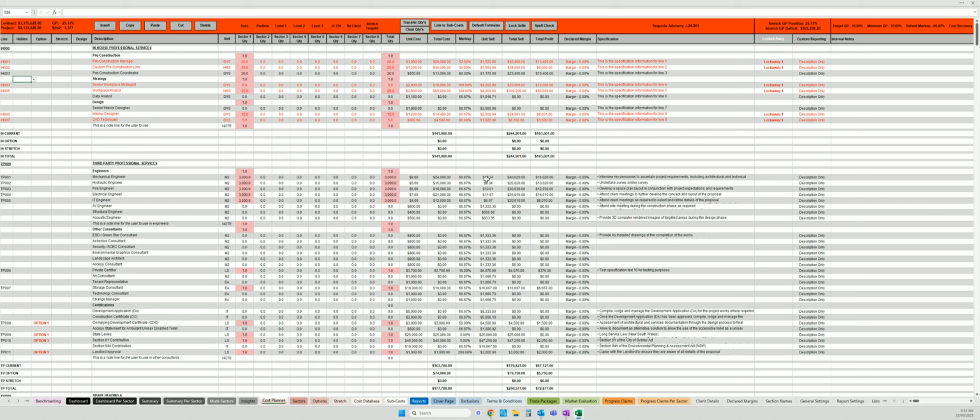So I don't need to jump around on screens to understand where my position is. As I'm cost planning the project on the cost planner, my ribbon is updating automatically. I can see my current position on the left, and I can see my stretch position on the right. In this instance, my GP of 25.11% is the same as my stretch position of 25.11%, showing a stretch GP deficit of 165,000 odd dollars. And as I go through this cost planner, these numbers will update live. So right now, I need to look through the cost planner and work out where I think I can make up $165,000.